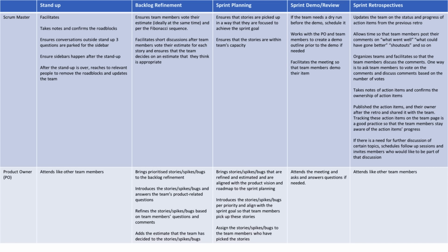Now let's review the Scrum Master's role in sprint planning sessions. The Scrum Master ensures that stories are picked up in a way that they are focused to achieve the sprint goal, and ensures that the stories are within the team's capacity.